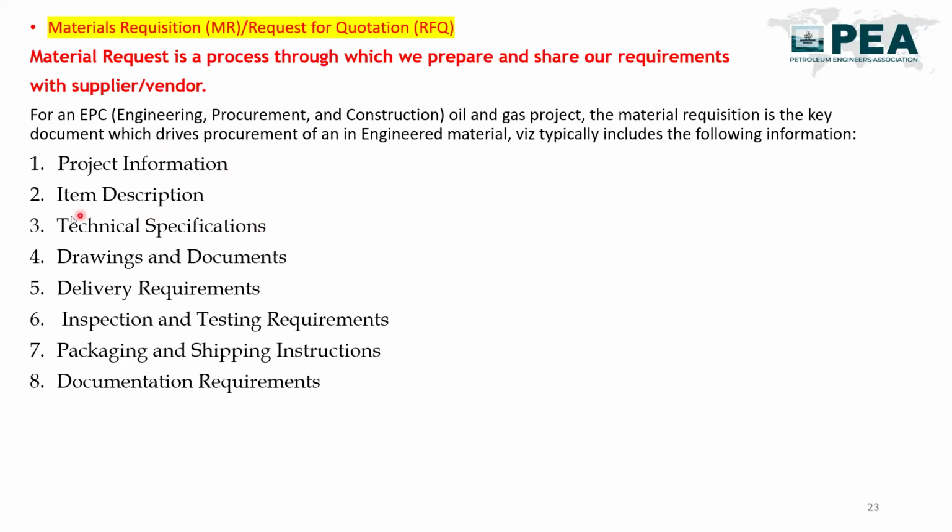If your technical specification is higher grade, the price will be high. If the drawing and documents requirements are many, or if faster delivery is required, the price impact will be there. If you ask for special inspection and testing, the price impact will be there. If you want special packing and shipping type, the price implication will be there. Documentation requirements also impact the price.